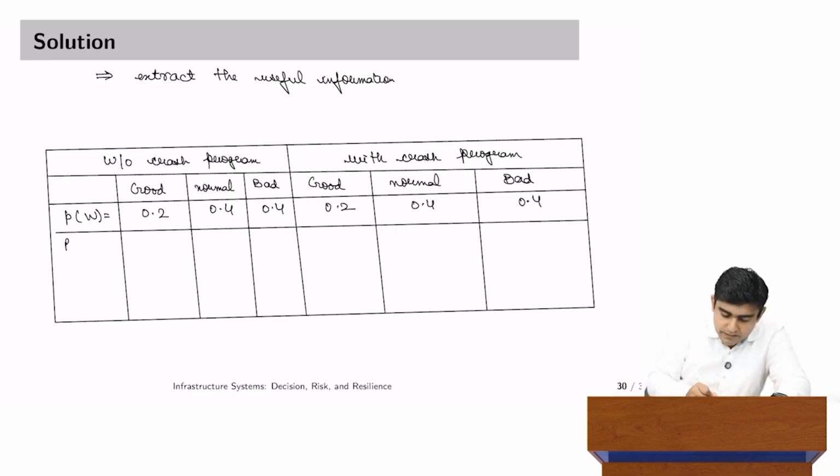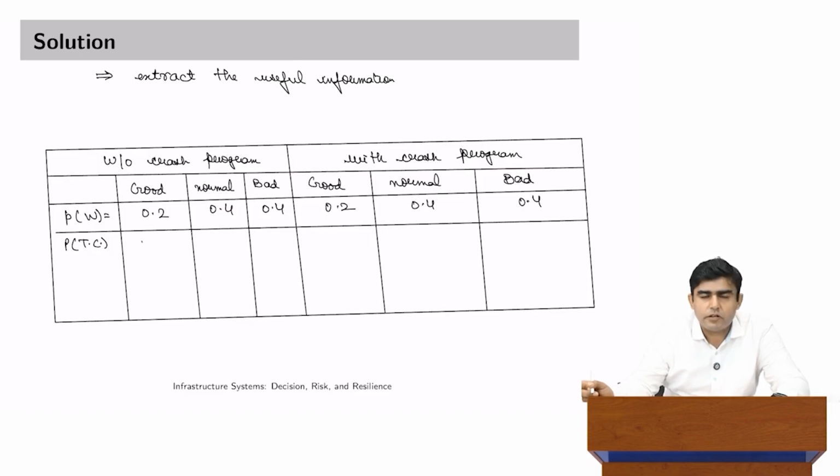So, we have sort of converted lot of information given to us in one of the rows in that particular table. Now, next thing is probability of timely completion. When weather is good, contractor is 100% sure that project will be completed on time. So, we will assign this number as 1.0. When weather is normal, he says that it is some function which I have to infer from the normal distribution delays, but it is not just a number I can put like 30%, 20%, it has to be calculated from probability distribution function that is given to us, and similarly here we will have f of 2.